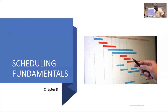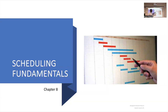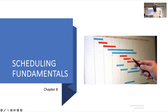Now we're moving into scheduling. This is a Gantt chart — this will make or break you. You've got to plan everything. A Gantt chart shows each activity and its timeframe. For example, the top row might be permits — it takes one day. The next task might take another day or two, and so on. This is called a Gantt chart, or bar chart schedule.